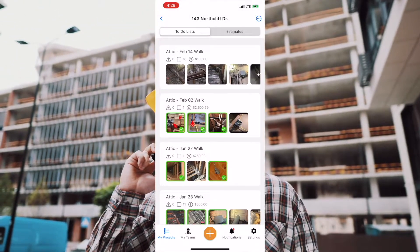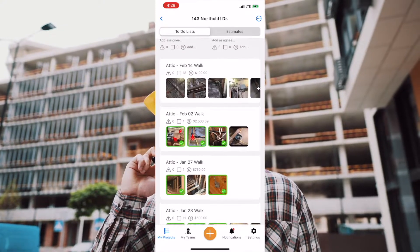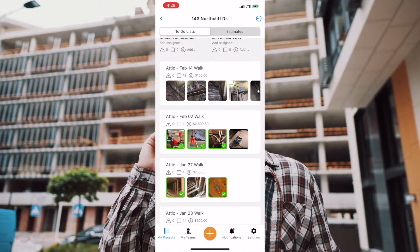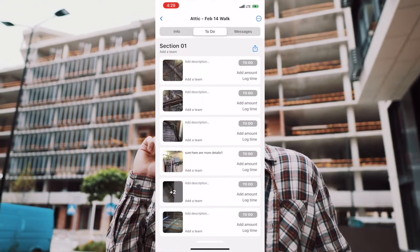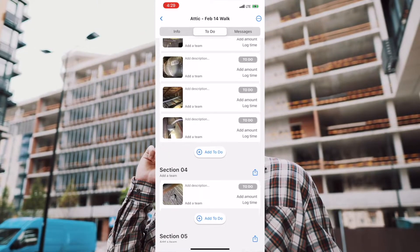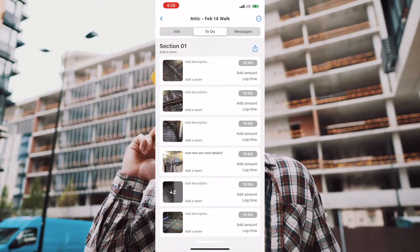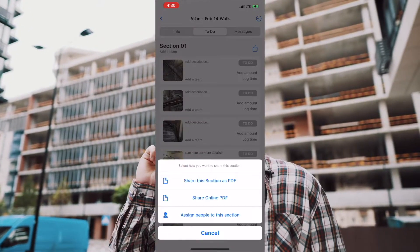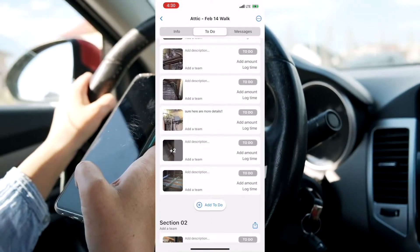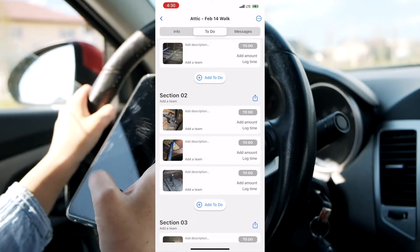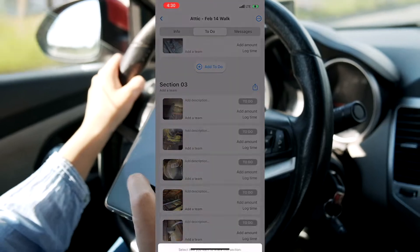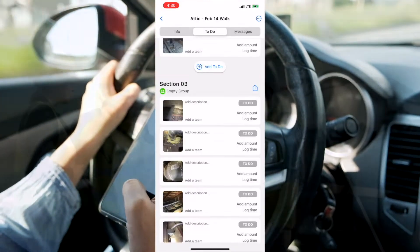Let's now open a to-do list that was created and start working with my teams. This is an inspection I did in the attic of a single-family house on February 14th. I'll assign the first section entirely to my electrician, then section 2 to the plumbing contractor, and section 3 goes to the HVAC.